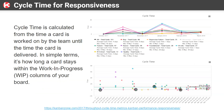The next metric is cycle time — about responsiveness. Cycle time calculates from the moment a card enters a WIP column to the moment it exits into done. It's the time spent on the cards themselves. You track it to get a better understanding of which types of cards take more time than others. If you look at the data: regression failures took only one day to turn around, bugs took six days, Kaizen cards took nine days on average, and the overall board average was four days — the average of all card types. This gives you information so that if someone requests work, it will most likely take around four days, though some things might take longer or less.